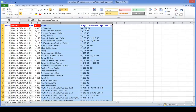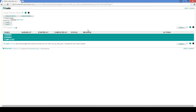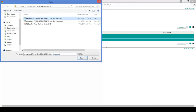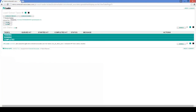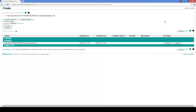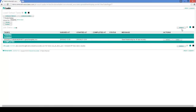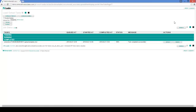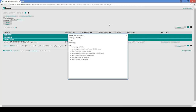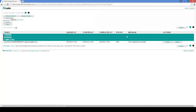Let's go back to the P6 Loader. I'm going to choose the file I'm going to upload, open it, and then upload. Once uploading, I'll hit refresh. The task has been completed successfully. It's always good practice to check the details window to make sure there are no errors or warnings during the process.